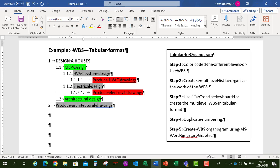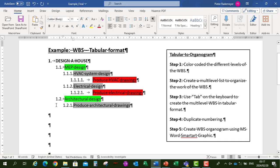Then under Architectural Design we have 'Produce Architectural Drawings', tabbed in twice. So that is our work breakdown structure in tabular format.